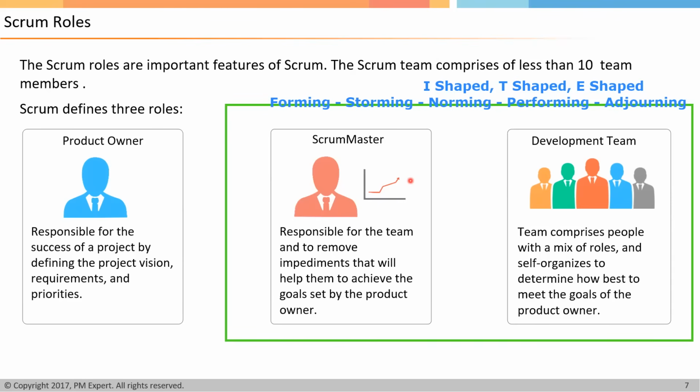If he sees the development team is spending more than 15 minutes, let's say 30 minutes in daily stand-ups, discussing multiple other things, then he can come into the picture. He will coach them on why we need daily stand-up meetings and why they should be restricted to 15 minutes only. So he's more like a process guy also, more of a governance on the process. He's a Scrum process expert as well, an excellent facilitator and a servant leader, right?